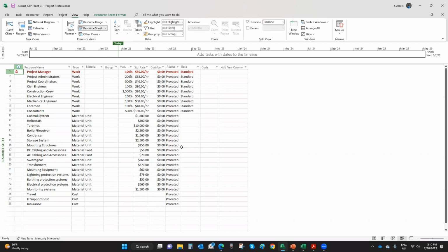Yes, it's because there are 5. However, it could be because there are 4 full-time and 2 half-time. Because half-time is 50%, when you have 2 people half-time, it will add up to 100%, right?